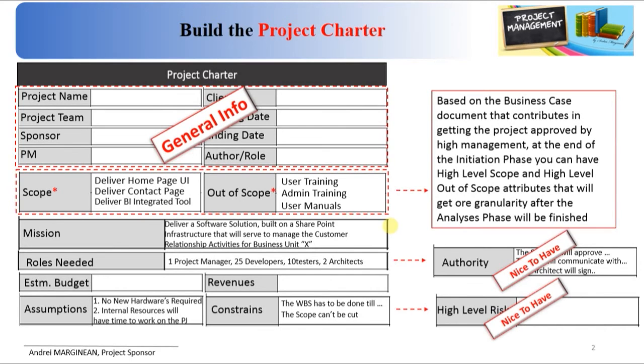In order to formalize everything, the project sponsor has to sign the document, approving everything that is written here, and the project manager has to sign the document as a formal acceptance of everything that was written here.